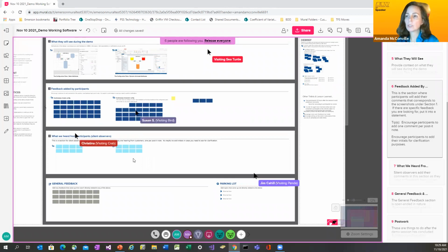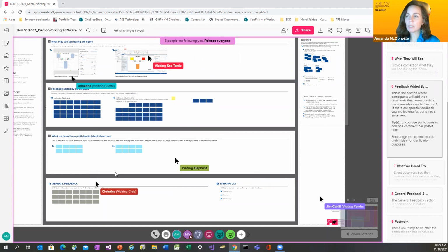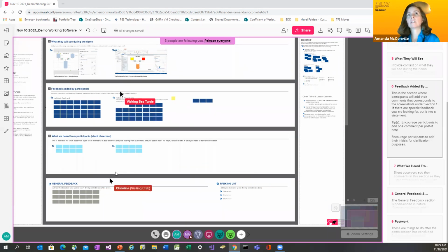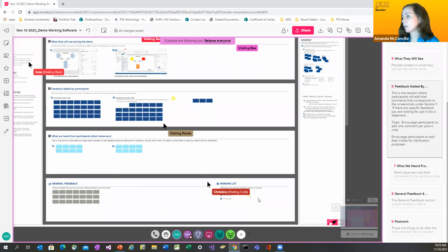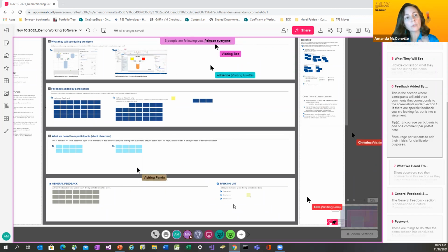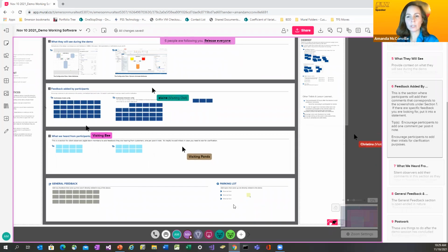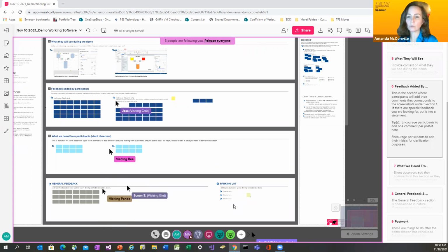And then for yourselves, if you're hosting one of these, there might be something a customer comes up with that you can't address in this particular scenario and you want to address later. So we have this area down here called the parking lot. You make notes of those things and we cover those with the folks at your demo at the end. In general, you cover everything with your customers at the end of the demo so that you make sure you got the gist of what they were actually saying as opposed to what you think they said. That's real important because yes, you've got the notes, but you want to make sure you understood those.